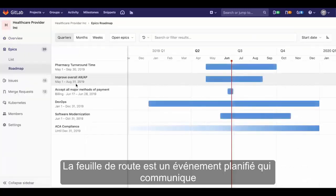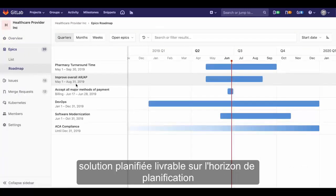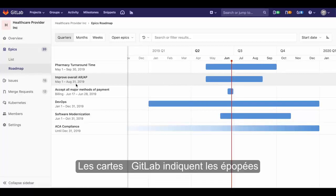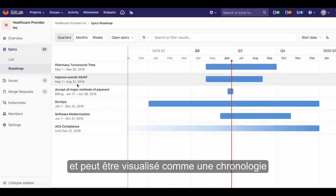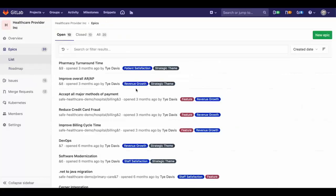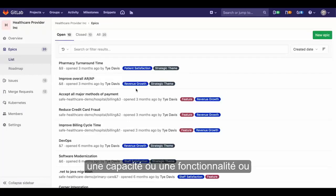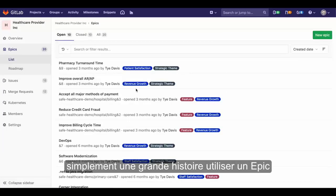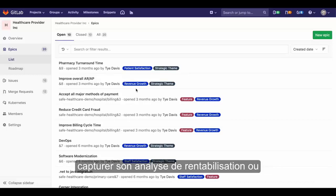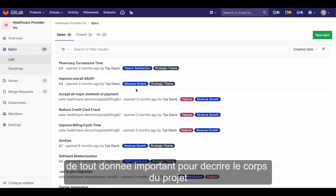The roadmap is a schedule of events that communicates planned solution deliverables over a planning horizon. GitLab roadmaps show EPICs' timeframes and can be visualized as a timeline. Whether a portfolio initiative or investment, a capability or feature, or simply a large story, use an EPIC to capture its description, business case, or any data pertinent to describe the large body of work.